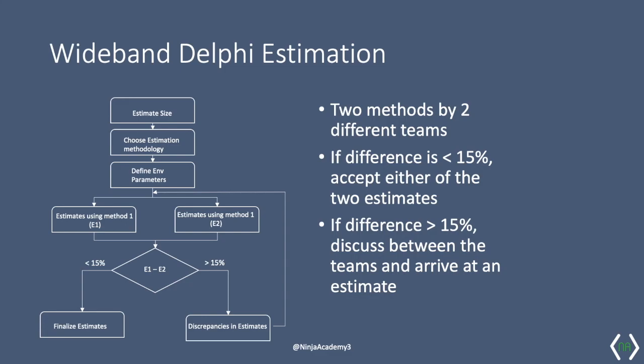If I were to give an example of when I'd use this technique of estimation, let's say you or your organization is trying to build a supply chain management product where there are multiple modules involved. You'd have to bring all the SMEs and divide them into two different teams, arrive at an estimate, and you'd usually have a moderator who would review each estimate, schedule the meetings to discuss further, and arrive at consensus.